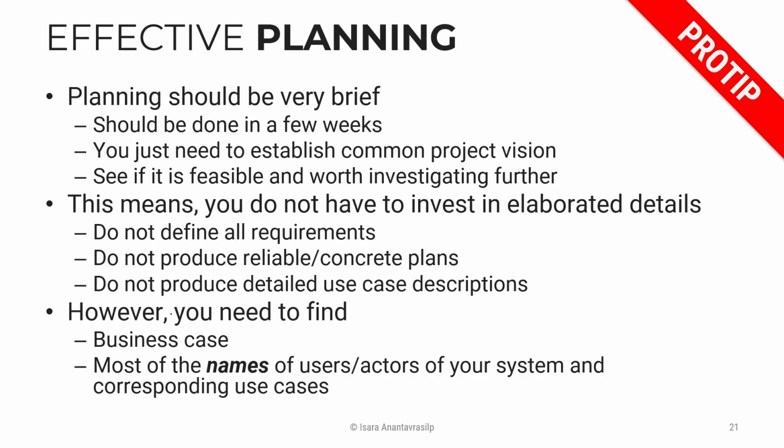So you invest on this. You might need to think about the upfront investment, or basically the development costs, and then operational costs: how to maintain, how to expand, not just the system but also the operation. How can you provide customer support? How can you provide technical support, and so on?